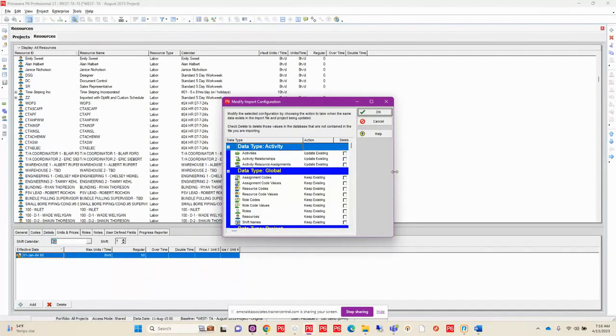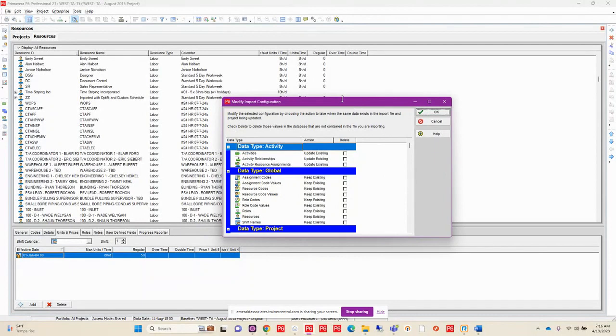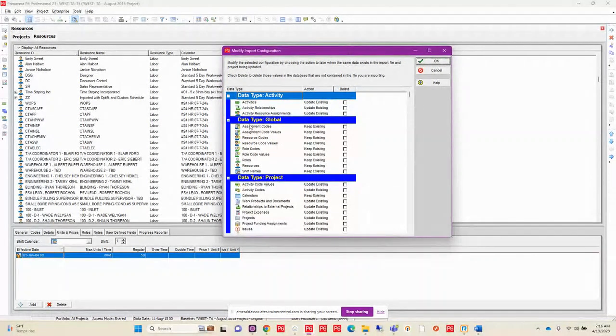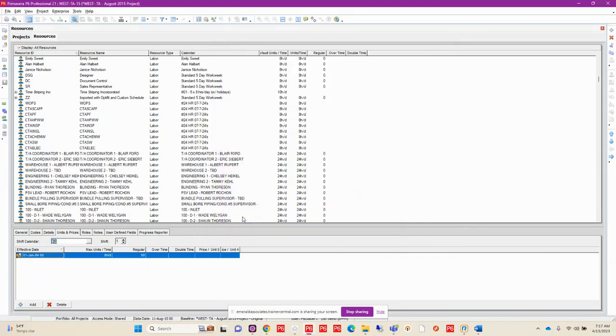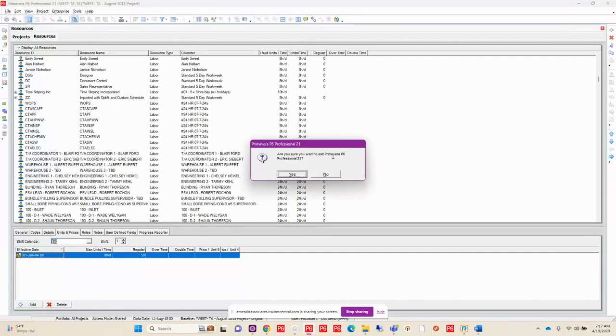However, if you look in the XER area here, you can see that it doesn't deal with anything like resources and where they're going to land, or for that matter, any activity codes that are at the global level. So, although P6 has a few things that you can handle while you're importing, it doesn't include every piece of information that you might want to handle within your P6 environment. So just some of the things I like to point out before I get into the tool itself.